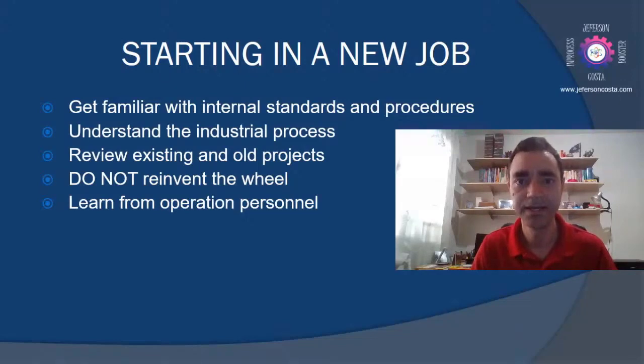And this is a kind of issue that when you go to the field and you talk to operations, or when you participate in the problems, you keep that in your life, and the next time that you do a pipe instrumentation diagram, you will add a note to not install the valve in the vertical position, for instance.